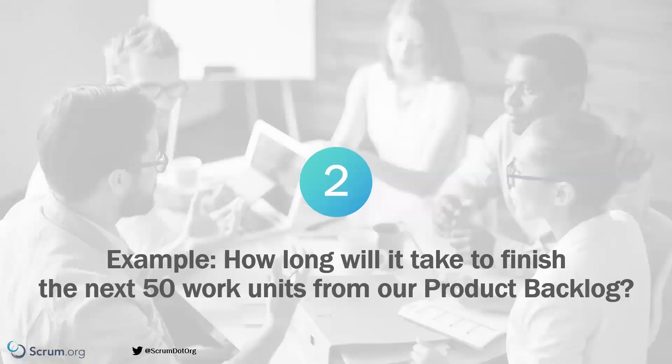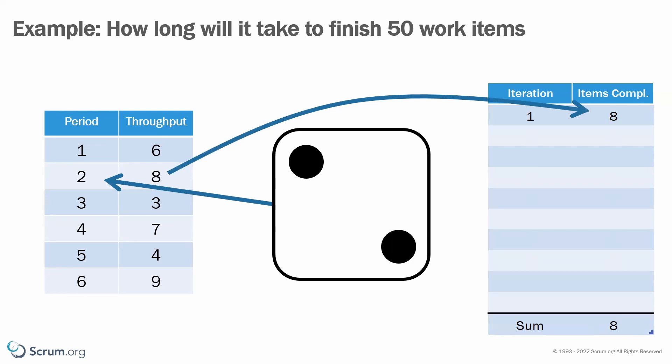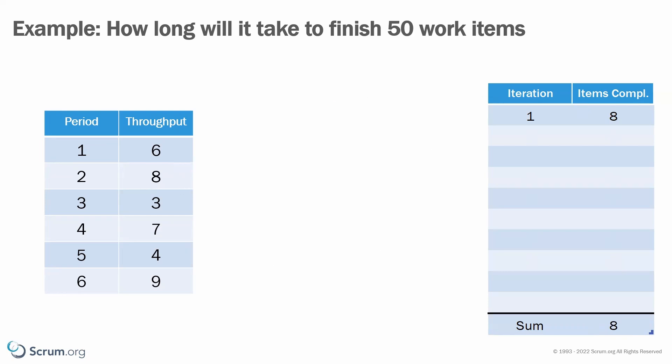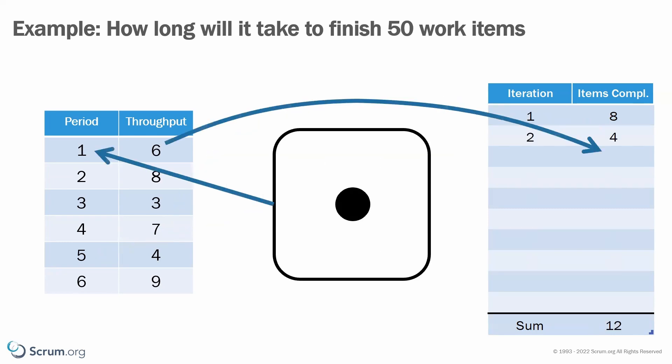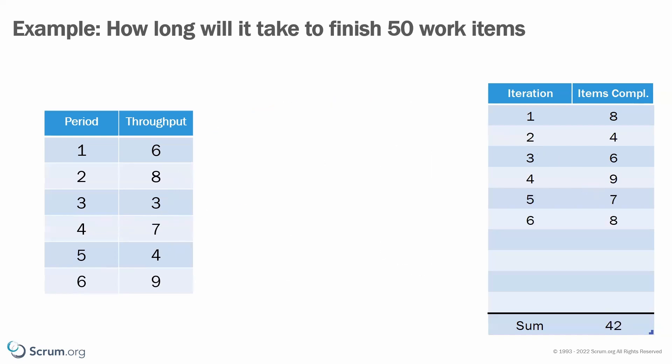We had a look at forecasting how many items we may complete in a certain period of time. Now let's look at how long it will take to complete a number of items. For example, let's say we have a backlog of 50 items to complete and we want to forecast when this is likely to finish. To simplify this, we assume the product backlog is stable — it does not change — and the same with regards to the performance of the team. It is important to note that you would not run the simulations only once; you would run this multiple times as new data constantly emerges, updating the forecast with the most current data.